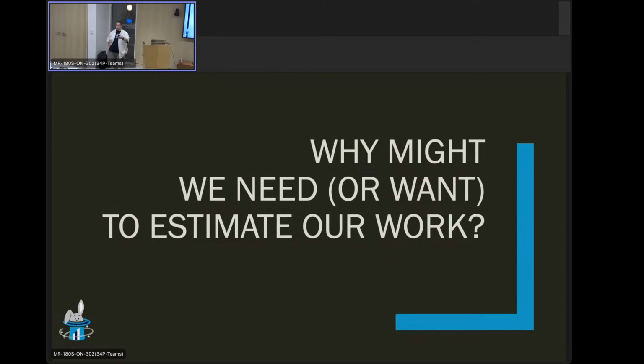Yeah, I'm going to say yes. Team, 6 developers on the team, 1 tester. They said, yeah, you know what? We think we can do this in 6 months. I said, cool. What about 3 months? And they went, not likely. I said, so what, like 20% likely? And they said, maybe at best case, very unlikely. I said, okay, so we're sort of in that 3 to 6 month range. Do you think you could do this? They said, yes. I said, cool.